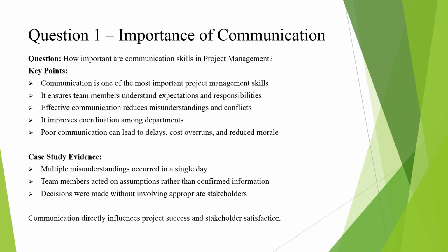And then last piece of evidence, decisions were made without involving appropriate stakeholders. Multiple times different people would make decisions on stuff without seeking out the stakeholders. I'll get to it later, but a prime example was the procurement coordinator, she went out and procured items for the prototype, and she didn't get with the development coordinator, so there was a disconnect there on purchasing the right item, and it led to issues down the road where they had to go out and rebuy items.